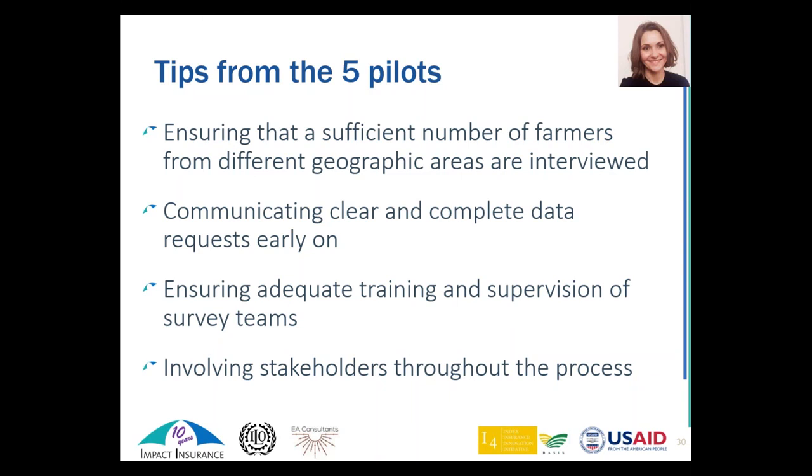Something else that we have experienced throughout these pilots is that for this type of evaluation, it wouldn't be uncommon to hire local survey teams to conduct the survey with the farmers. When that's the case, it's generally quite easy to find a team that is qualified and well-trained, but often they might not be familiar with this specific type of product or with insurance. And we noticed that the training and the level of supervision that we put into the surveying was very important and could help achieve much better results.